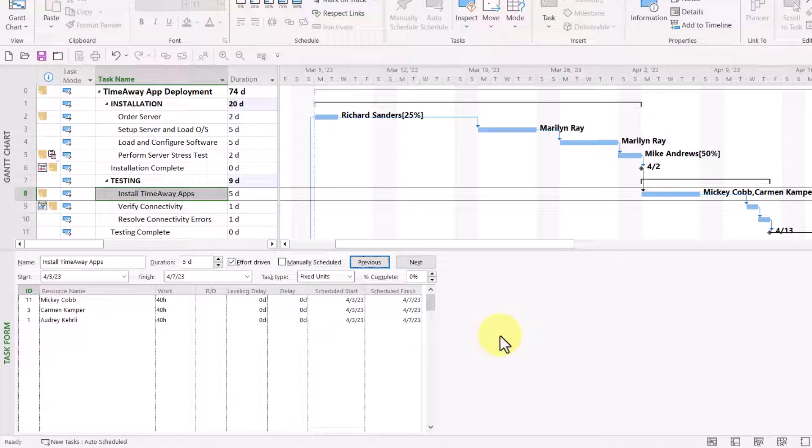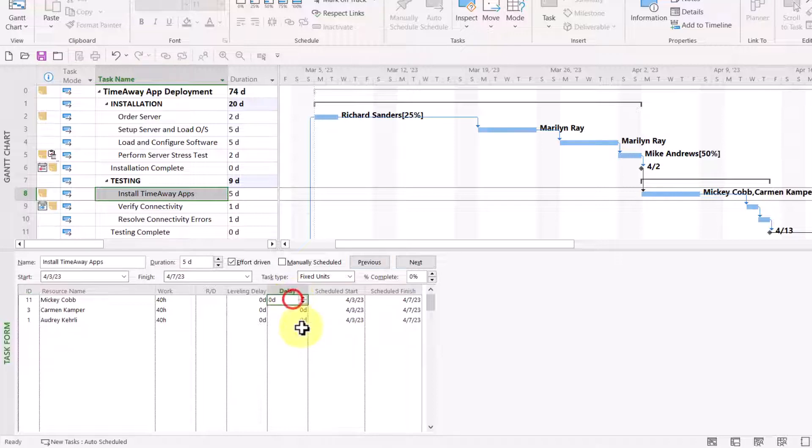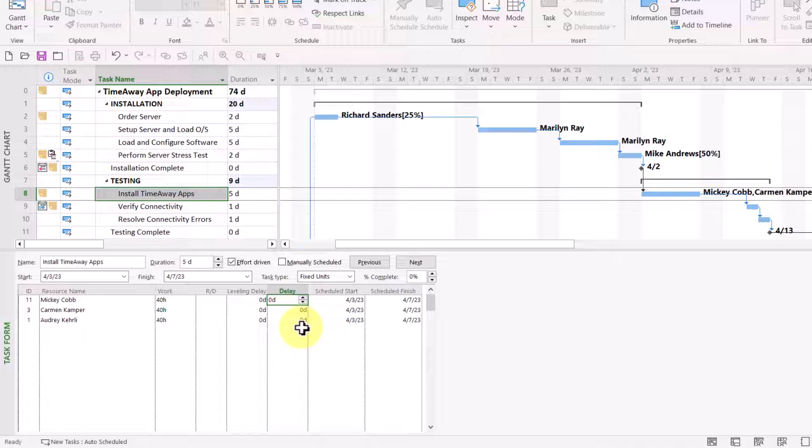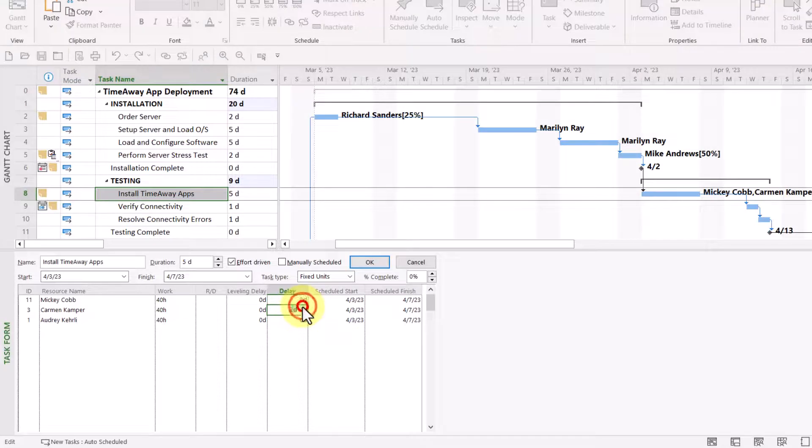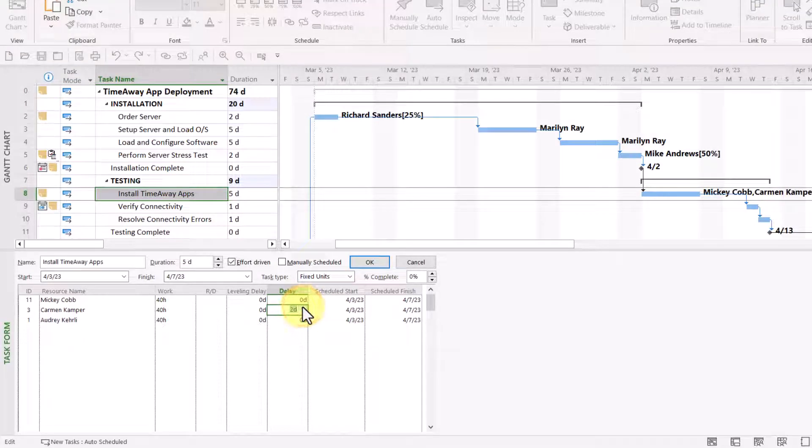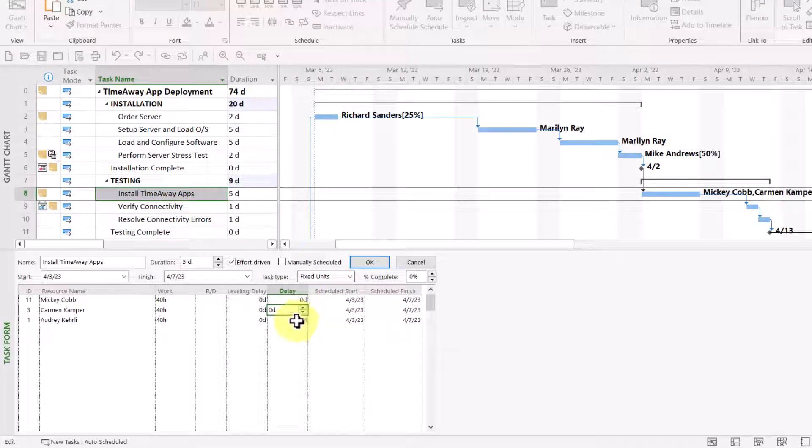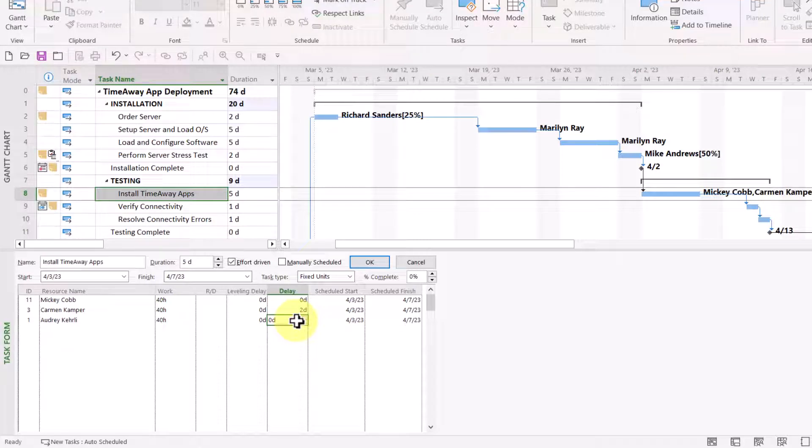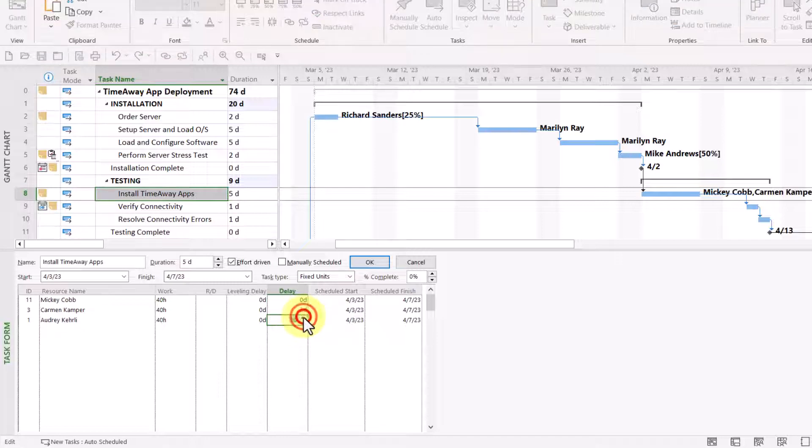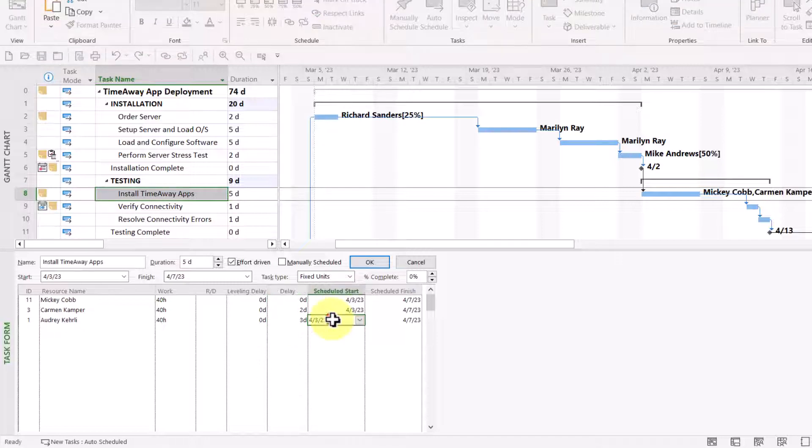This particular set of details is useful when you have multiple resources assigned to a task, but they cannot all start at the same time. That's our situation with Mickey, Carmen, and Audrey. Mickey can start on day one. Good. Carmen, however, will be delayed starting by two days. So, I'll put two days in the delay field. She has work commitments in another project, so she's going to come on two days later than Mickey. We have a similar situation with Audrey Curley. She can't start until three days later, again, due to a commitment on another project.